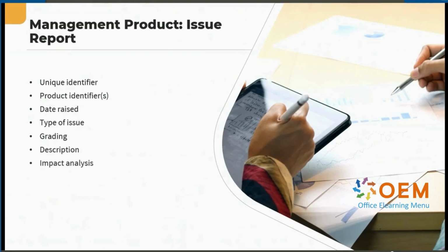We will also include an impact analysis, which will explore the impact of this issue on the project baseline. Next, we include options, ways in which the project, user or supplier could respond to the issue. And we include a recommendation, the decision recommended by the project manager or team manager.